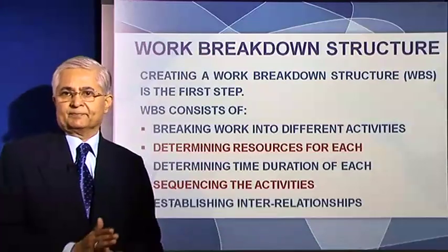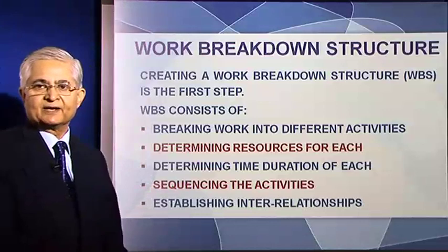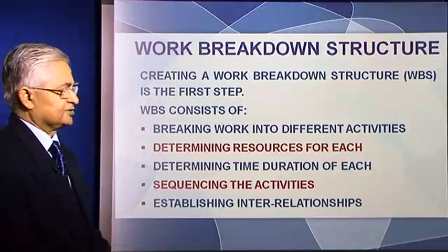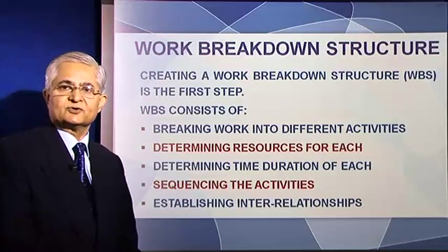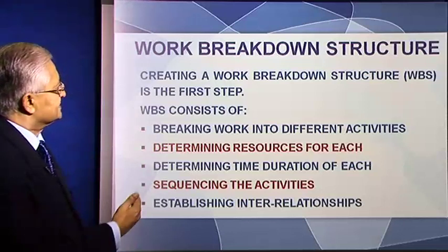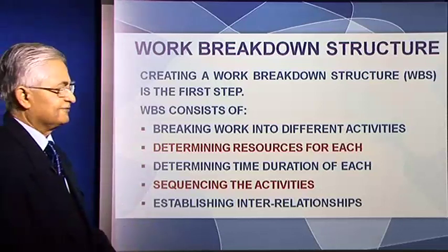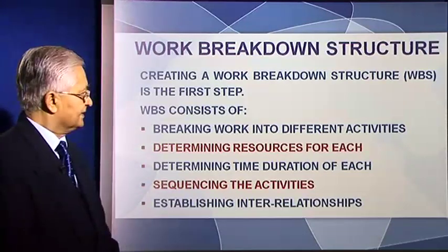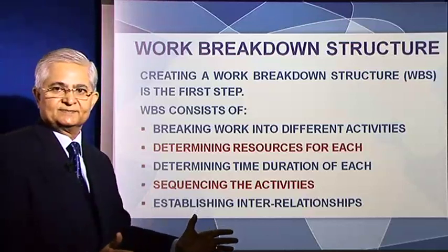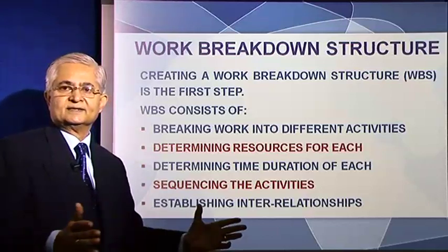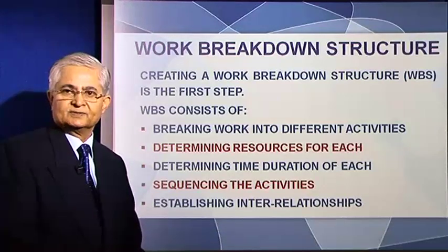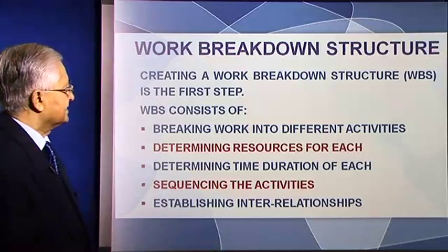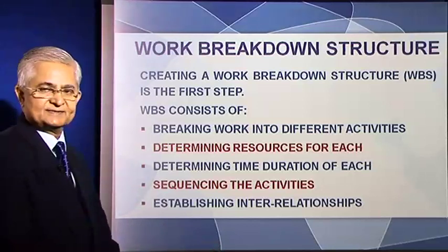What is the first step in the project management approach? The first step is creating a work breakdown structure. Work breakdown structure is WBS, right? This is the first step. How do we do this? We look at that whole process of strategy implementation and break it down into different activities.